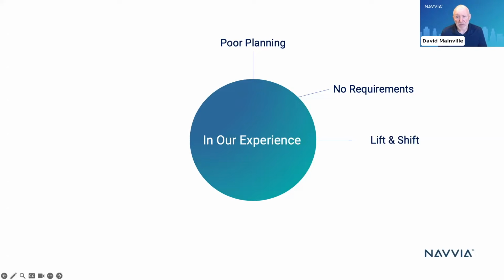Something we call a lift and shift. I don't know if you folks are familiar with the term lift and shift, but let's say you have an existing ITSM tool, and because of the lack of planning and the lack of requirements, you basically take everything you configured in your old tool and move it over to the new tool. So you don't spend any time rationalizing categorizations or workflows. You basically try to replicate what you have into the new one because you didn't develop the proper requirements for the implementation. So you're just lifting one problem and shifting it over to another. And you'll find out over time that that's not going to do it for you.